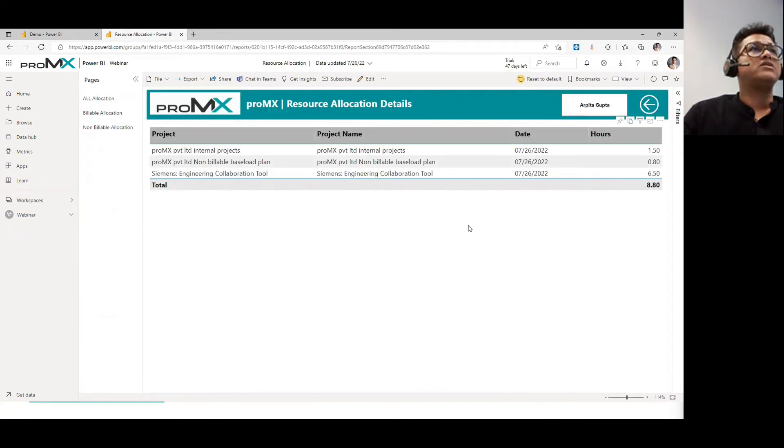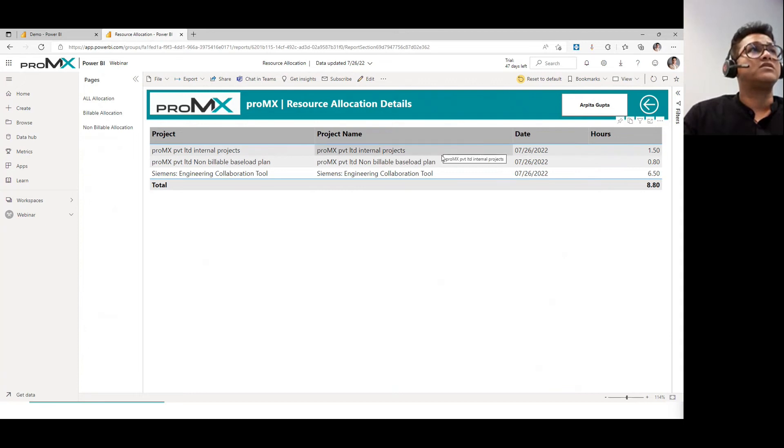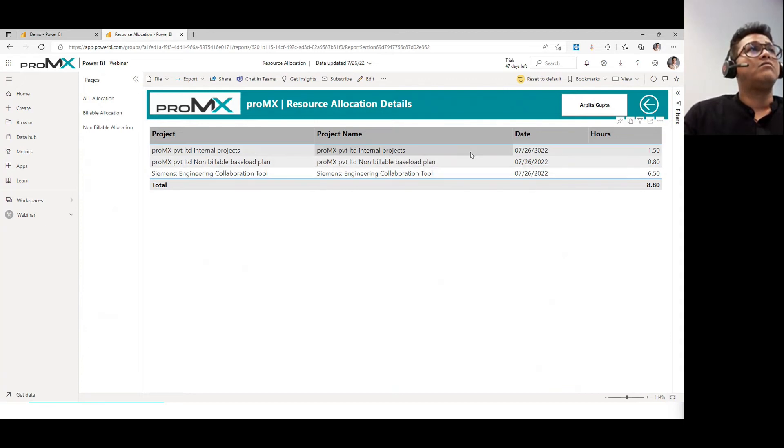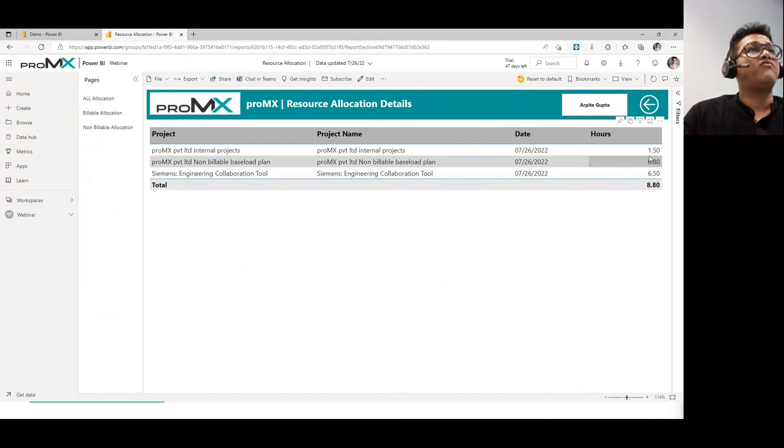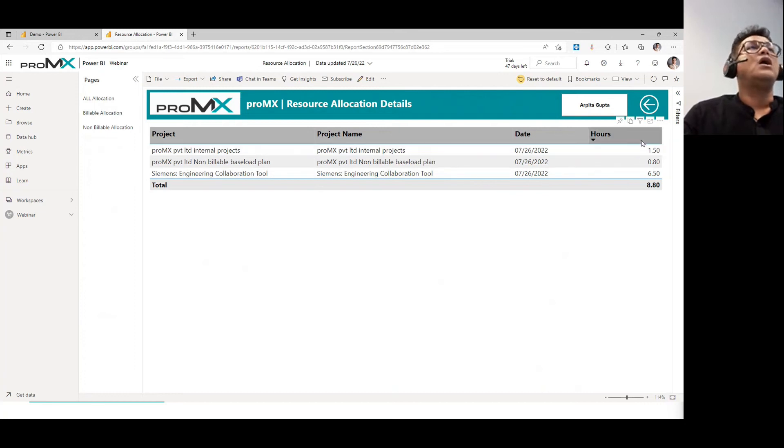And you will be able to understand, all right, on 26, this particular resource was allocated in three different projects. And for 1.5 hours on one, 0.8 and 6.5 hours, likewise, so total goes to 8.80. So that is how the spread is.